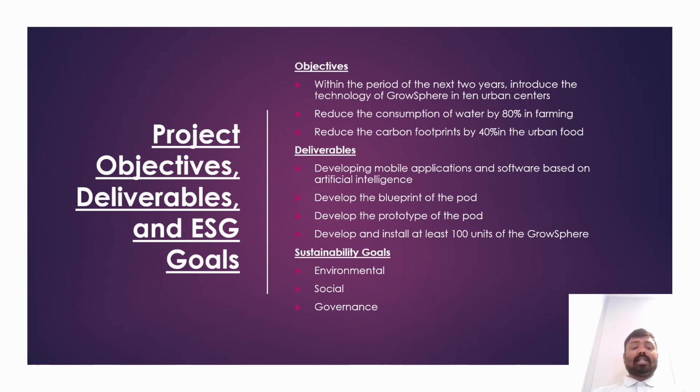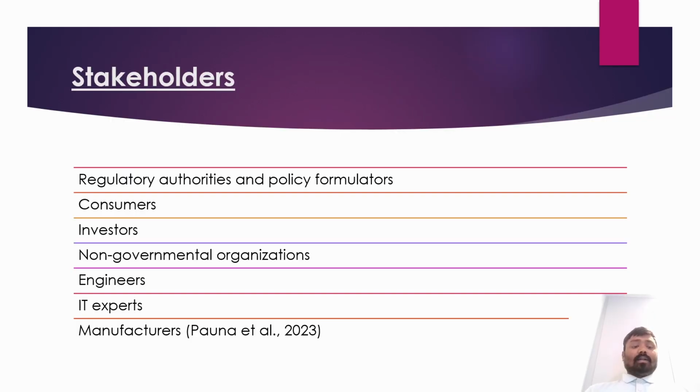Moving to design and development, I divided this complex phase into five workstreams. There is mechanical engineering, where we prototype the port structure using recycled aluminum; control software, building the AI-driven irrigation and climate control algorithms; material science, evaluating biodegradable polymers for non-load-bearing parts; life cycle assessment (LCA), modeling cradle-to-grave environmental impact; user experience (UX) design, ensuring our interfaces are intuitive for growers. In the map, each of these has its own box.